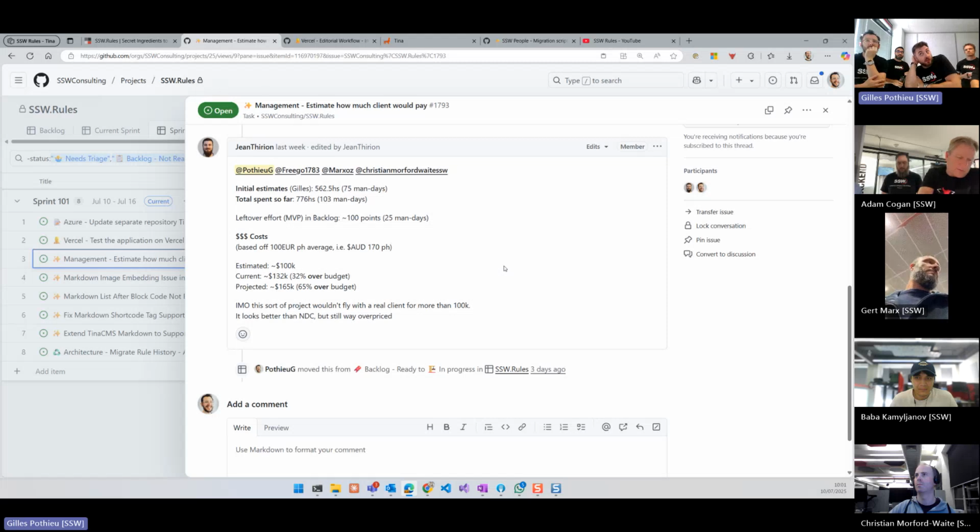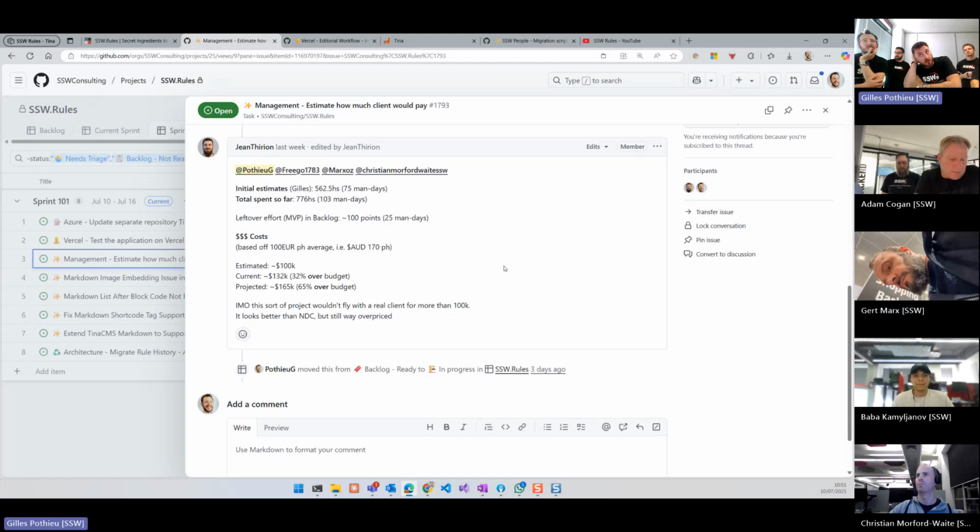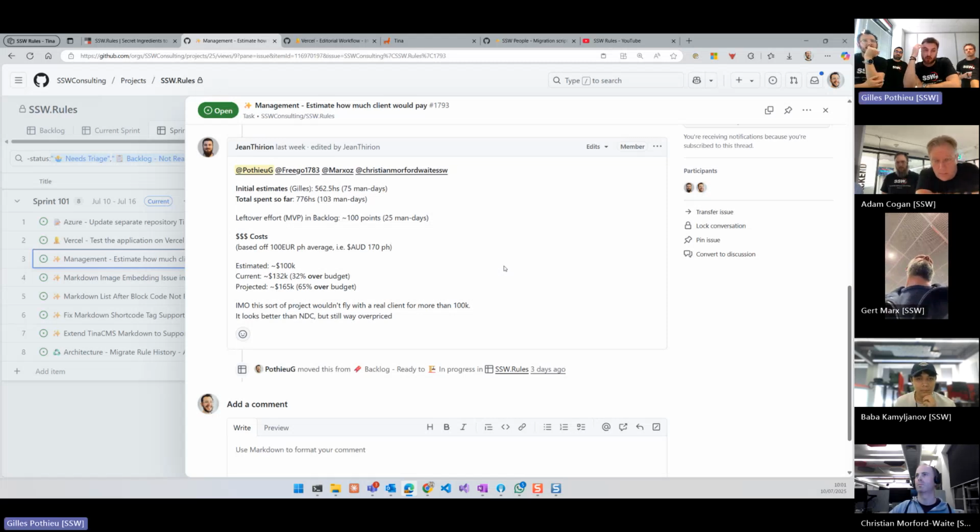So as expected, we are over budget. The initial estimated budget was about 100K, and we currently sit at 132. Based on what Gilles told me about what's remaining in the backlog, there's another 30K left. So the total spend should hover around 165K AUD, which is ridiculous for that kind of work.